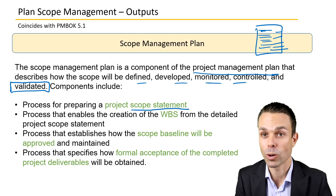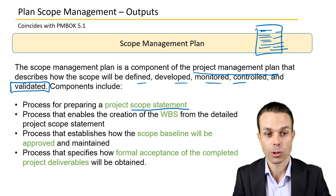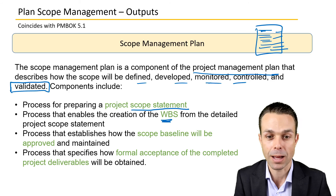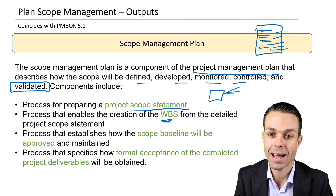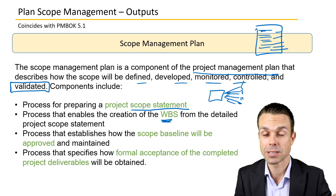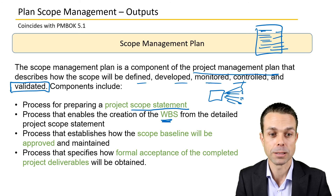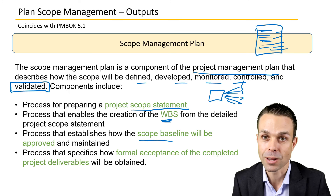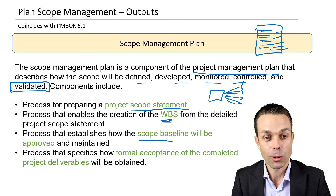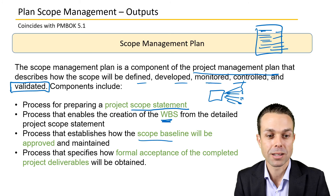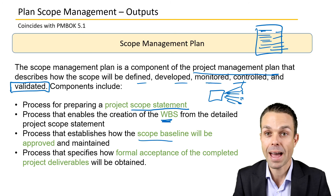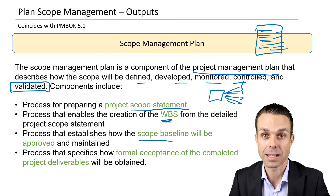Components of the scope management plan include: the process for preparing the project scope statement, the process that enables creation of the work breakdown structure from the detailed scope statement, and the process that establishes how the scope baseline will be approved and maintained — for example, whether the project sponsor or a steering committee needs to approve it. There is also a process specifying how formal acceptance of completed project deliverables will be obtained, which is the Validate Scope process.